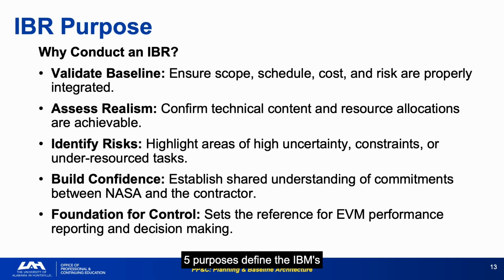5 purposes define the IBR's value: baseline validation, realism assessment, risk identification, confidence building, and establishing the foundation for EVM performance reporting. Build confidence. Establish shared understanding of commitments between NASA and contractor. This is the soft benefit that gets overlooked. When the IBR works as designed, both parties leave with the same mental model of how the project will be executed. Identify risks. Highlight areas of high uncertainty, constraints, or under-resourced tasks.